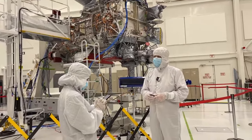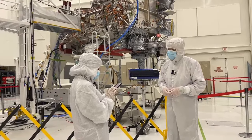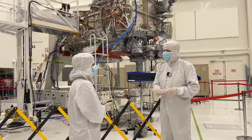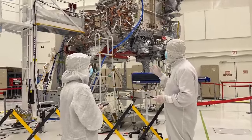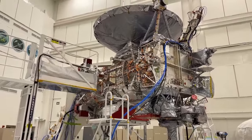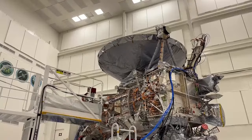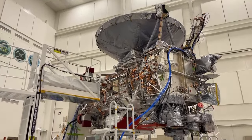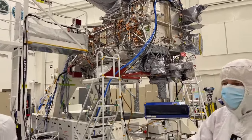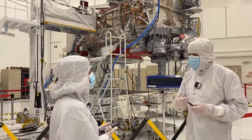Very cool. And then we have Ashwari Official on Instagram who wants to know, how much time did it take to make and how many chances to fail on its journey? Another great question. So we really started the design in earnest in 2014, so we're about 10 years into that. All the parts started being built in 2016 through 2019, 2020. By 2022, we were starting what's called full system integration and test, where all the parts got delivered to JPL and we started to test it as a system. And so that's the timeline for coming together.